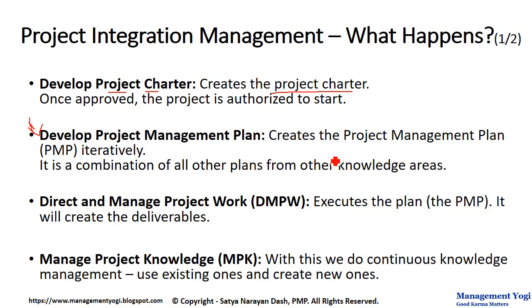This process creates the project management plan, or in short PMP, iteratively. The output of this process is, of course, as I said, the project management plan, and it contains a combination of all other plans from other knowledge areas, that is, scope management plan, schedule management plan, cost management plan, risk management plan, resource management plan, etc.